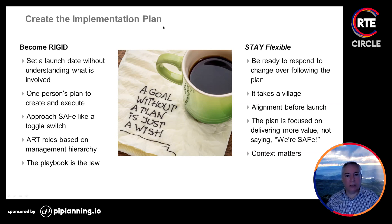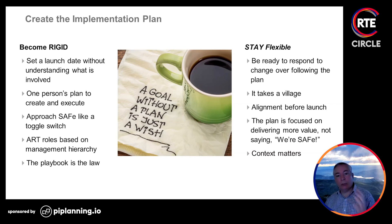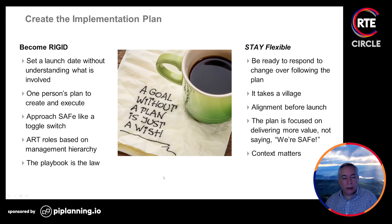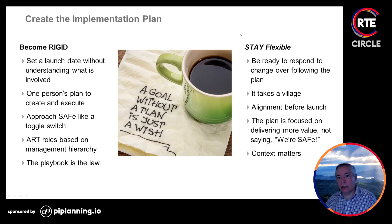ART roles are often based on management hierarchy — the project manager becomes the RTE, the program manager becomes the product manager. Those people might not be the right people for those roles. Don't think about hierarchy; think about who's best to fill those roles. Some companies develop a playbook — a set of rules and processes to implement SAFe — but what you should have in mind is the interpretation that's best for your context.